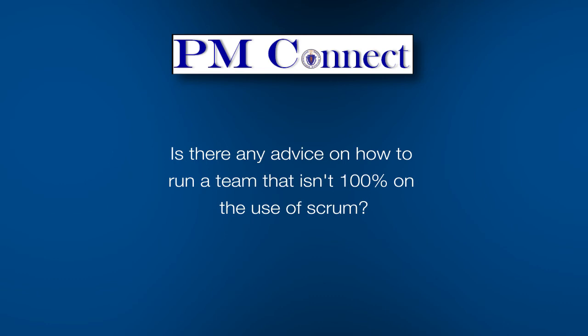And again, it doesn't matter if you have a tool to use or not. I run into this all the time. I have multiple projects that are running. We're using this methodology. And yes, I have one resource that's split across multiple projects. So what we've done in that particular situation, any sprint that you have a number of working days, you have a number of hours that you're going to be dedicating. Make sure you're very upfront with each project and with each Scrum Master that there's only this many hours dedicated